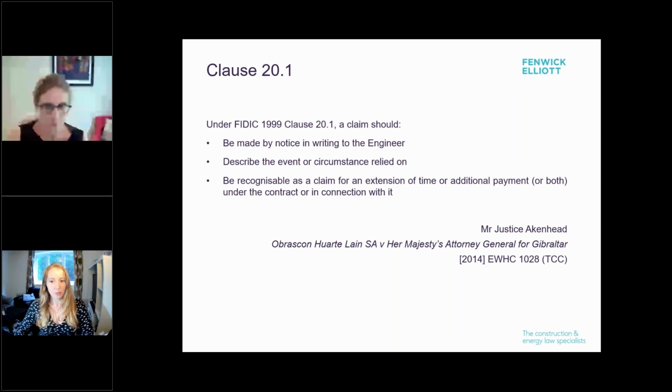Subclause 8.4, which deals with the contractor's entitlement to an extension of time, and specifically states that this entitlement arises to the extent completion is or will be delayed, influenced the interpretation of the application of the notice provision in 20.1. Essentially, in light of the fact that this entitlement was triggered to the extent completion is or will be delayed, the judge concluded notice did not need to be given until there actually is delay.